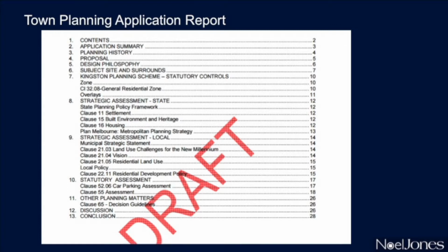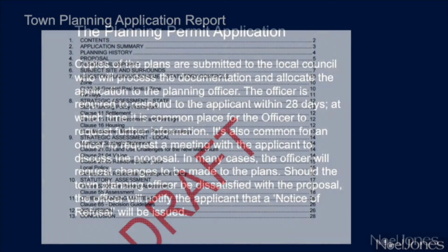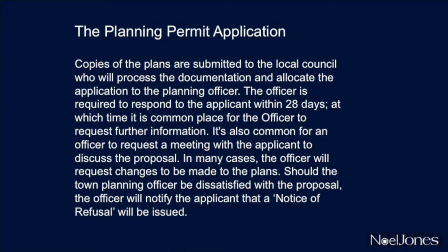You can see in this slide the detail that is simply required. The planning permit application: copies of the plans are submitted to the local council who will process the documentation and allocate the application to the planning officer.